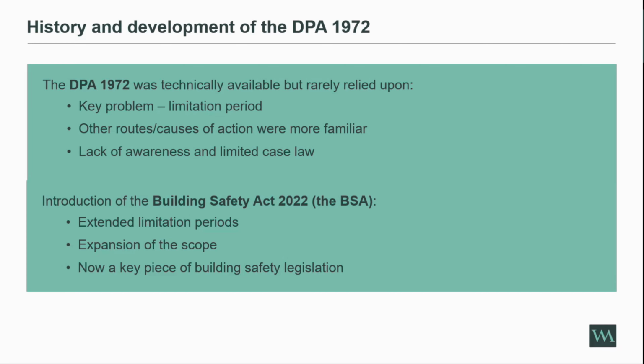This is a legal point, but one point I think is worth remembering is that the DPA is a statutory obligation. It cannot be contracted out of or restricted in effect. So it applies regardless of what contractual terms are entered into. And because of that, it's a really useful tool that we can use in pursuing claims.